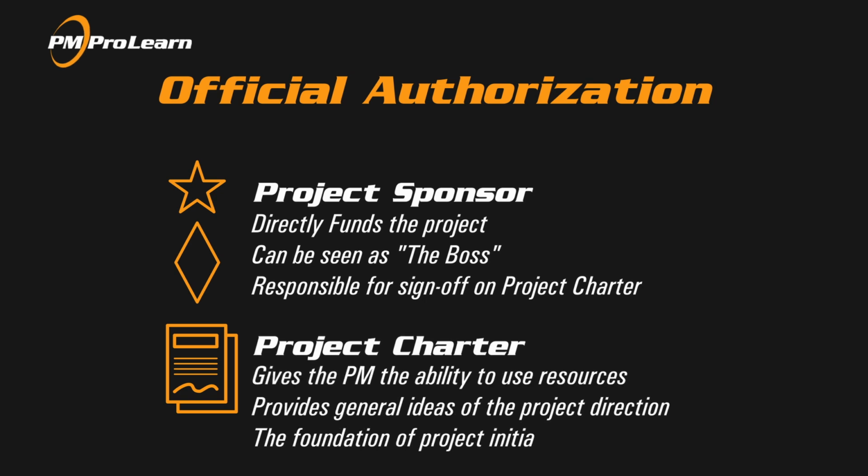the project. The document is used as a high-level overview of the project, so it does not contain a large amount of in-depth detail, but having the charter allows for the intent and general estimates to be known and for the direction of the deliverables to be understood. The charter outlines details such as project objectives, key stakeholders, and the scope of the project.